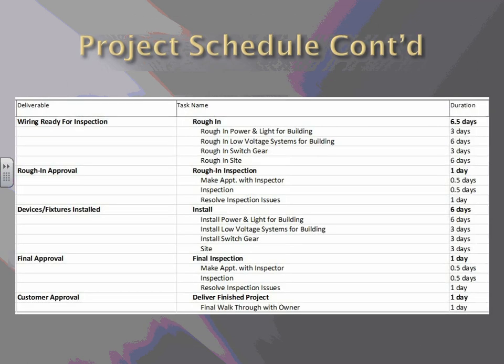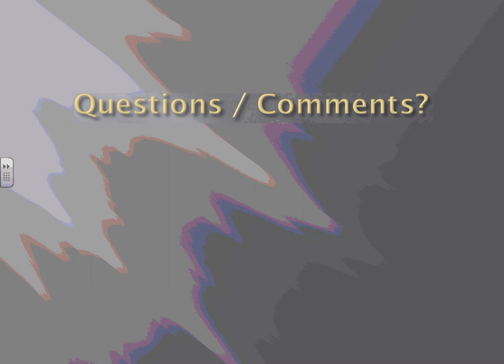For the construction part of the project, we estimate that it will take around 15 days. This includes the rough-in inspection, installing the devices, the final inspection, and the final walkthrough with the customer. Any questions, comments?